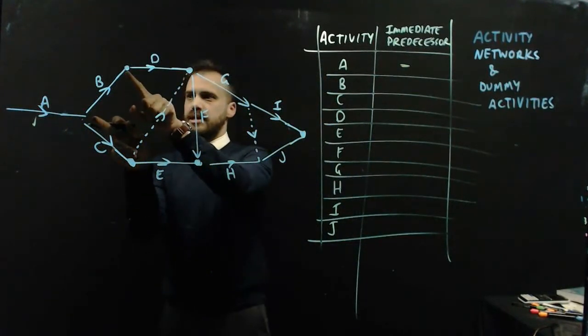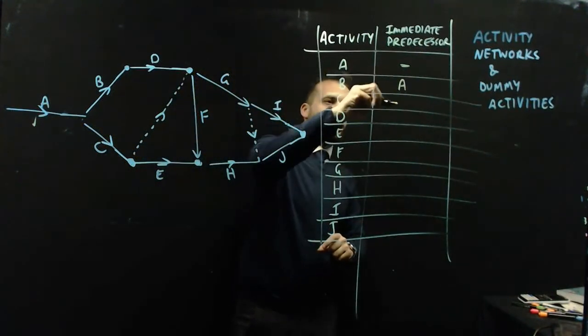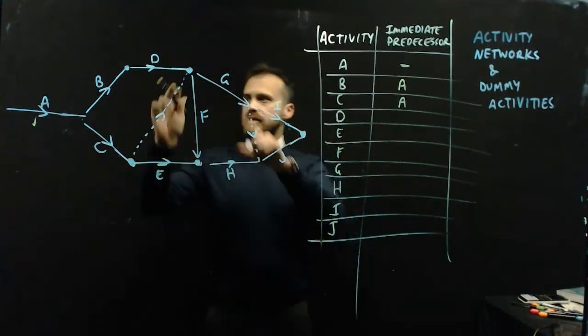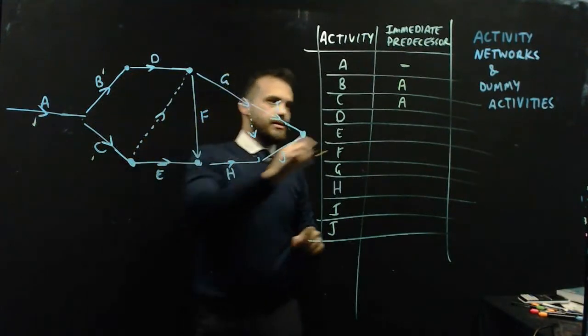What about B? B has an immediate predecessor of A and so does C. So B and C both have immediate predecessors. Easy. I've done B. I've done C. D has an immediate predecessor of B. Done.